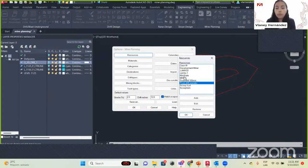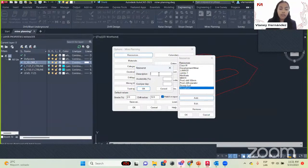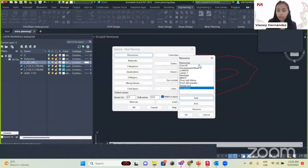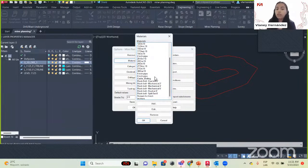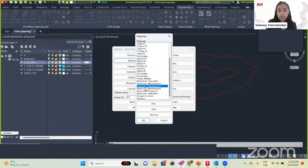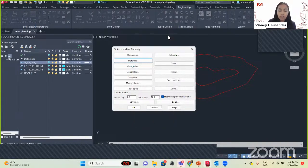You can remove resources or add new ones. You only need the description — that's the name shown — for example 'Jumbo 1' or 'Mixer', the availability of this equipment, and the cost per day. Now we will go to Materials. Materials are things that are going to be used only once — for example pipes, rock bolts, and cable. If you click Edit, you see only the description (a name) and the cost per unit. That's the difference between resources and materials.